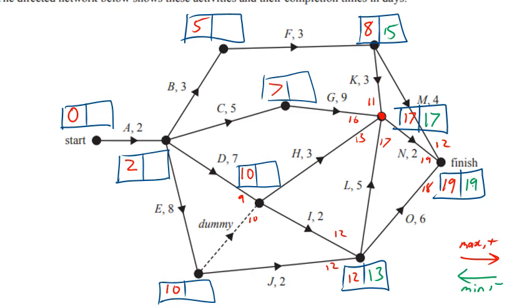Now we've got to go back against a whole bunch of arrows again. So actually the 17 minus 3 gave us 14 here. So I've already made a little boo-boo there. Let's go back to the pen, and that's actually 14 because 19 minus 4 is 15. So we could have actually had a 14 there. And then 14 minus 3 is 11, and that's going to answer a question for us because that's the activity F, and there's our float time up there.